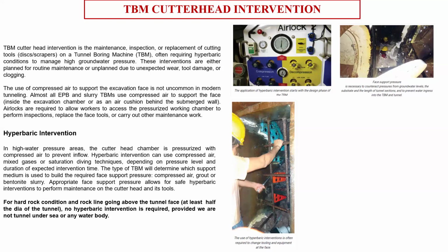So all these things are done after the legal survey has been completed and the legal survey has been checked by the designer. Then the designer decides what will be the rectification measures to make it a durable structure for 100 years.